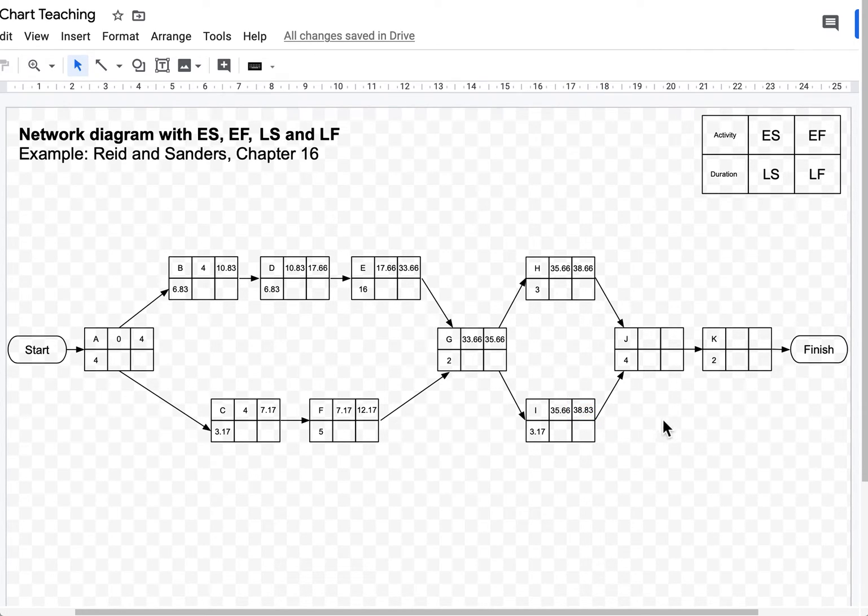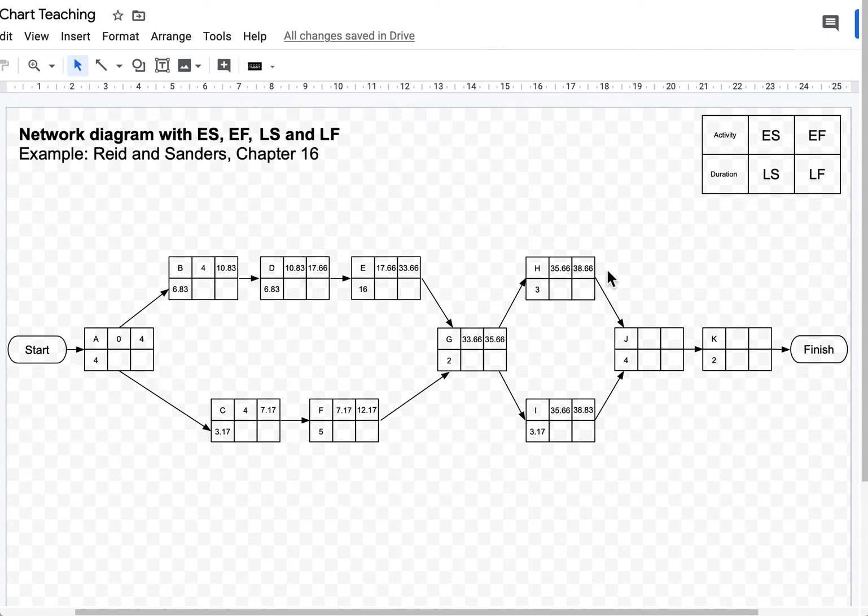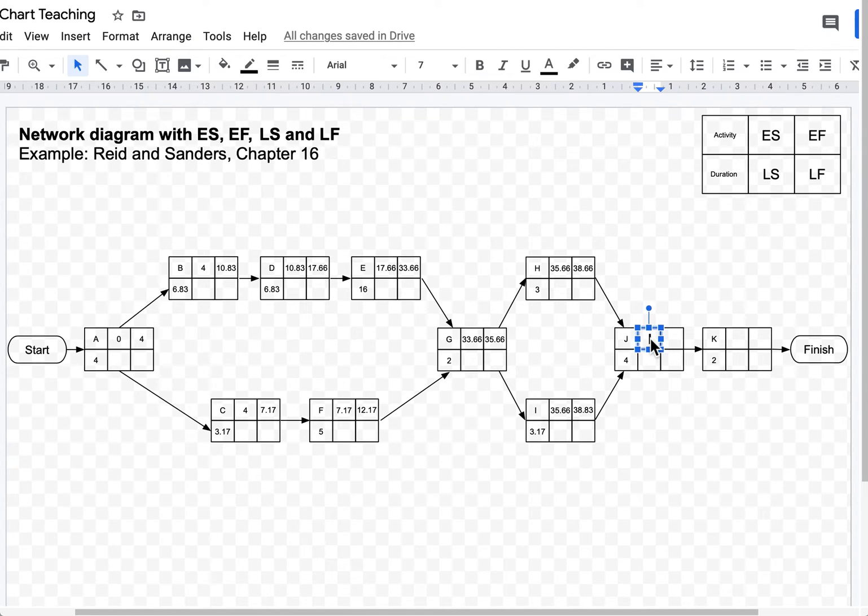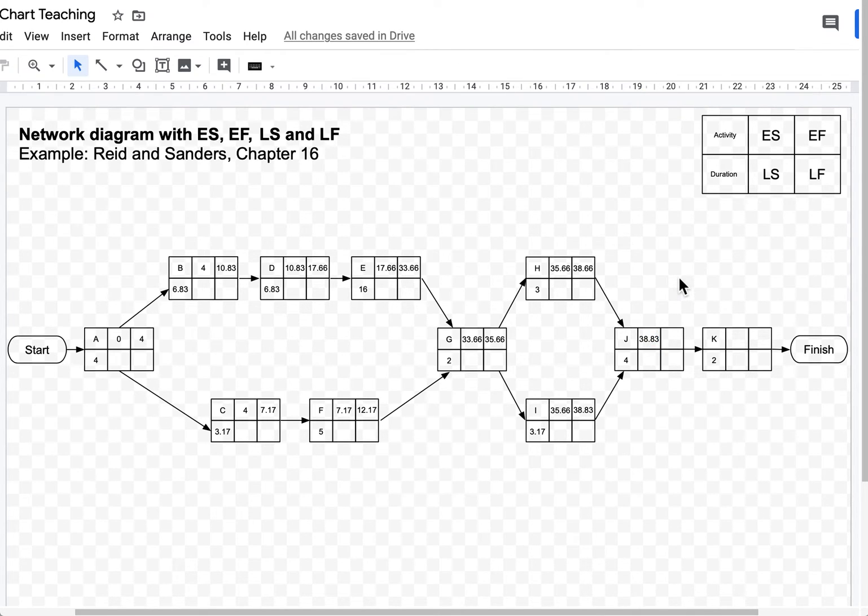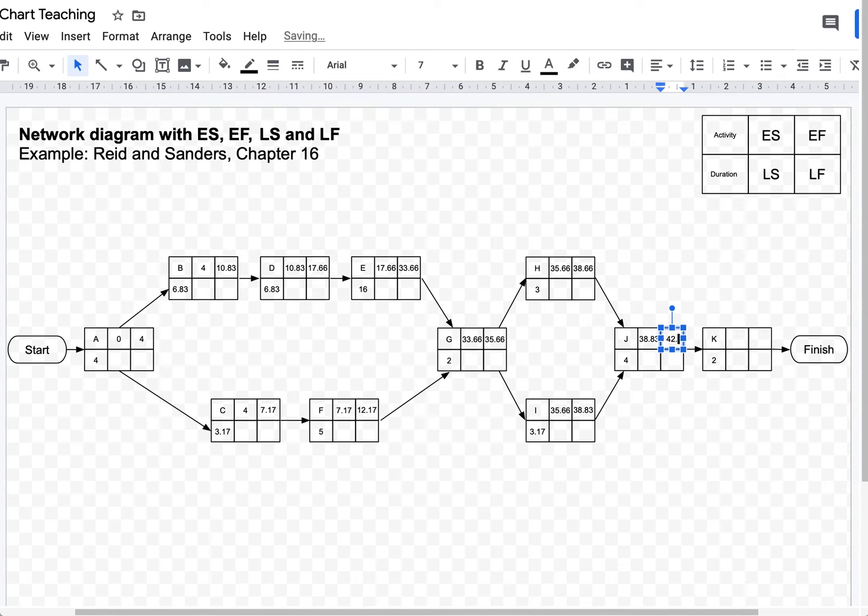Again, I have a decision to make for activity J. Which one should I choose? Should I choose 38.83 or 38.66? In this case 38.83 is a little bit bigger. So 38.83 will go there. 38.83 plus 4, that's 42.83.